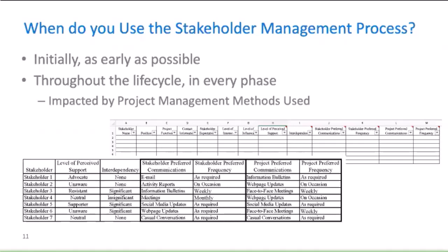When you engage stakeholders also depends on the type of project management method that you're going to use. For example, if you have a very traditional waterfall method project, say you're building widgets that you've built 100 times, you just need to build them and stick to the plan, you're going to have very little stakeholder engagement throughout. It's more going to be informative and not very much interaction, because change introduced into a waterfall project is typically very costly, and you really don't want to encourage that.